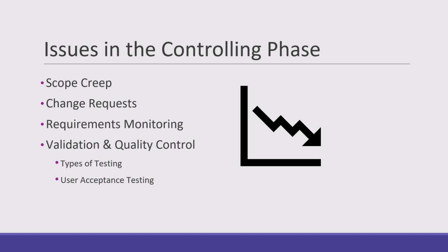Change requests are simply a formal way of tracking modifications to what is included in the project. With our hybrid project management model, we can accommodate for these changes within the backlog refinement and sprint planning meetings. The cyclical nature of the Scrum sprint and the flexibility that Agile project management provides can drastically reduce scope creep.